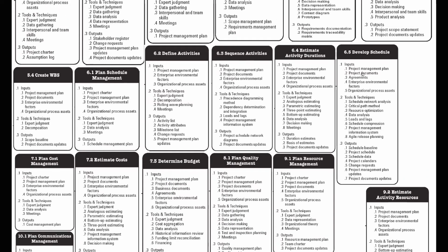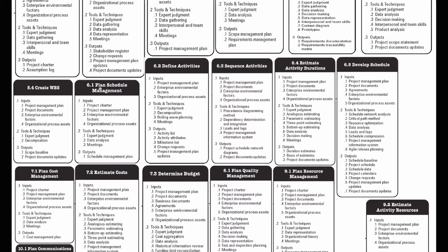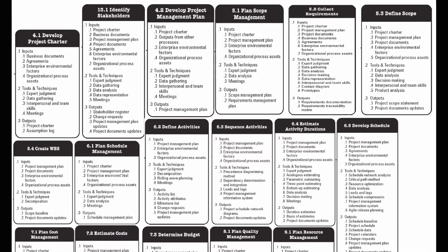There is no charter in develop schedule. There is no charter in estimate. There is no charter in sequencing, and there is no charter in defining the activities. So if you look, all the plans contain the charter. So this charter is going as an input to all 10 plans, plus identify stakeholder and also the collect requirements process. It's going as an input to those. So this option is finished.